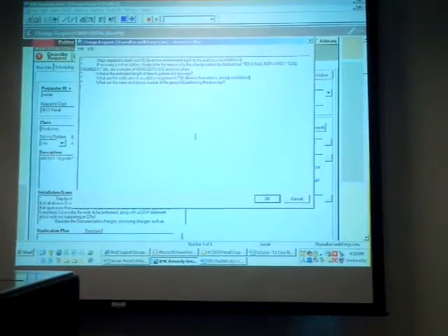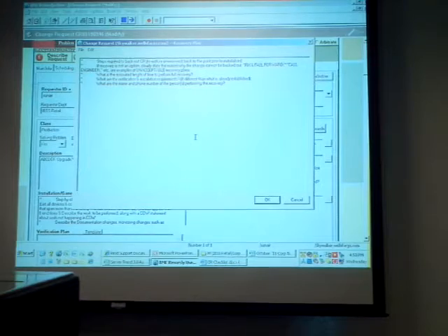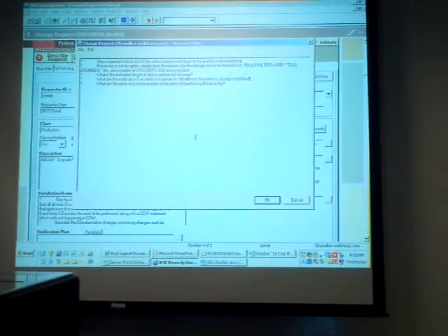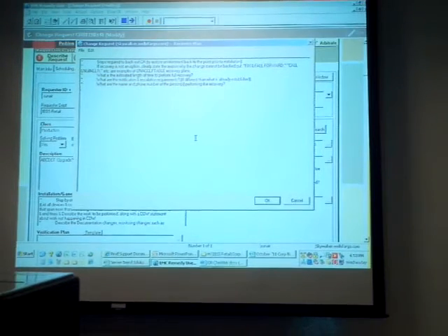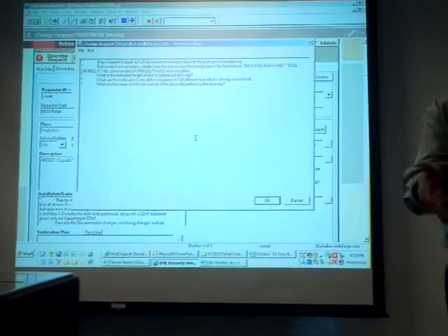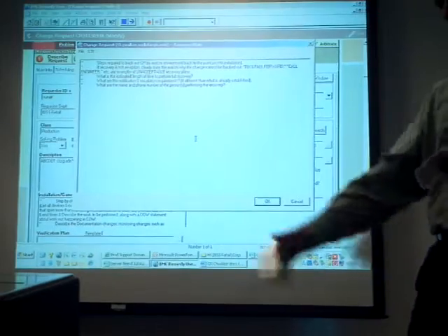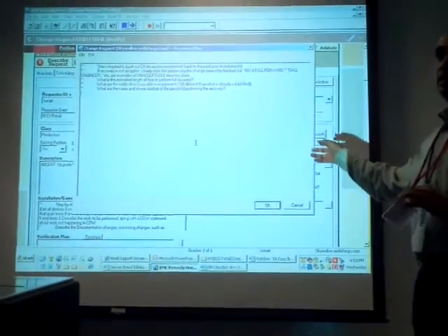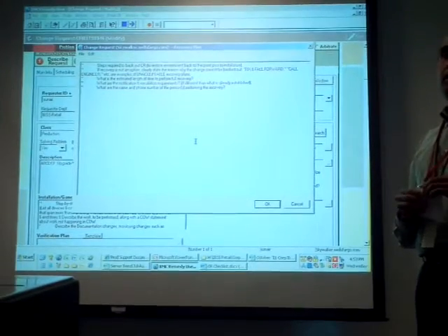For recovery plan, we're talking about ECRs and doing it after it's already done. You still need to put a recovery plan even though it's already fixed. You have to document it. You perform the change, installation is done, but the issue occurs after 4 days, 5 days. Your recovery will be useful then, so you have to capture it.